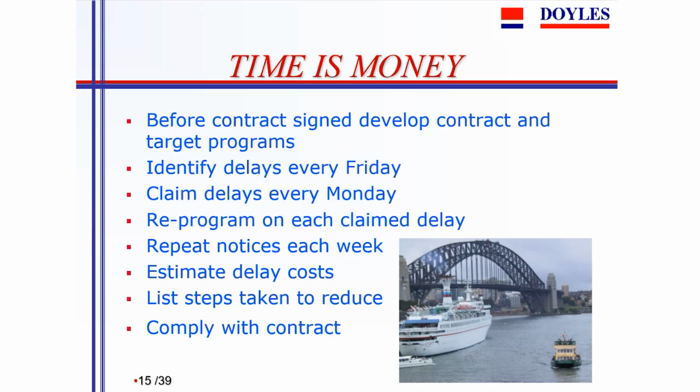Additionally, the valuation of variations is very important, and it often is vital that you include pricing schedules in your contract, which say that if you order 3 more cubic metres of concrete to be laid, that certain amount of price will be adjusted. And it's important that those rates are sufficient to do the work and obviously not excessive. It's important to understand that there may be differing levels of profit for a contractor depending on the amount of work he gets at that rate.